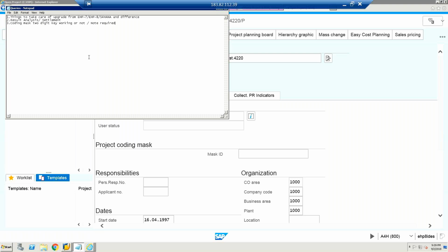Maybe your civil work can be a separate project. Your mechanical work can be a separate project. Your SCADA work, your electrical work, these can all be separate projects, right? So how can you see the impact, how can you analyze the data from the different projects under a single roof? Here you can see the relation, how it is exactly impacting the overall analysis at the master project level, right?